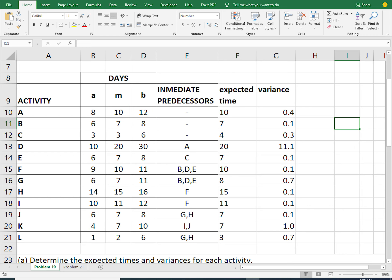To find the variance, we take the optimistic time and subtract the pessimistic time, then divide by 6 and square it. Since we have already calculated the expected time, we can go ahead to create the network diagram.